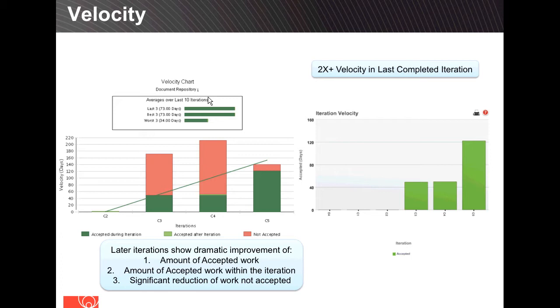So the total bar represents that team's commitment for that sprint, and it's measured in the story points scheme that they've chosen. It is up to the team, when they make that commitment, to take into account what our resources are. If we're losing people in this sprint, we need to plan accordingly. If we're gaining people, we need to plan accordingly, and that might mean reducing our commitment as much as it means increasing it as you absorb new people. So that has to be a component of what you plan.